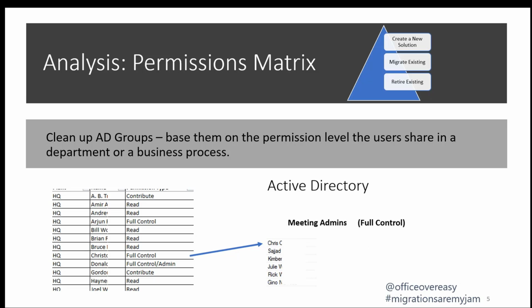And so I would hate for you to architect your team's environment and then go back and have a duplicate team, which is exactly what's going to happen. So my suggestion, based on the order that you would do things so that you would have the least possible issues, would be that you clean up Active Directory before you migrate it to Azure. And it's because it will be so much more clean for you. So for those of you who haven't started, you can still potentially influence this, but you may not be able to. Like I said, oftentimes Exchange is a completely different team.